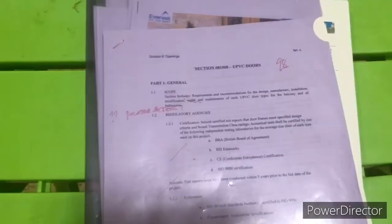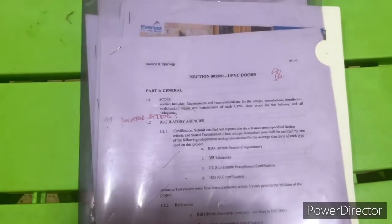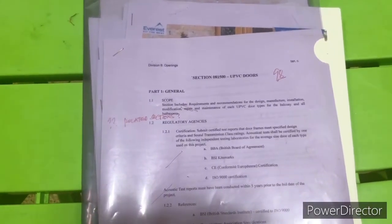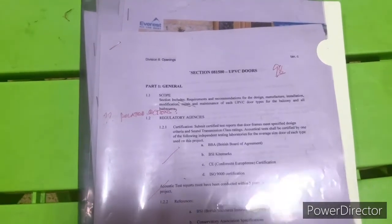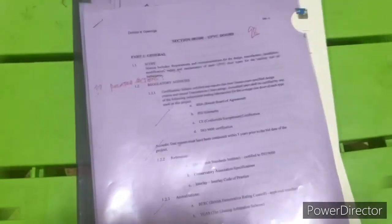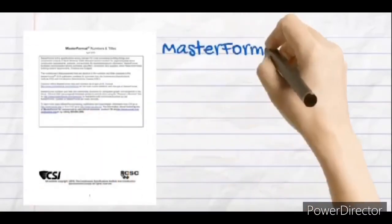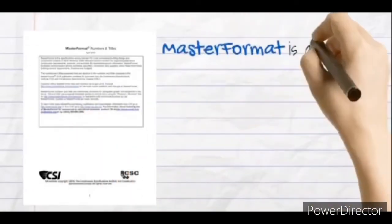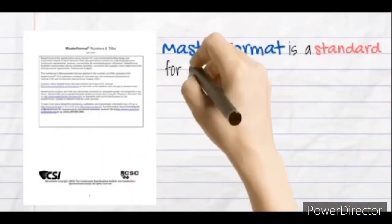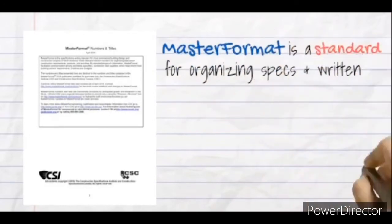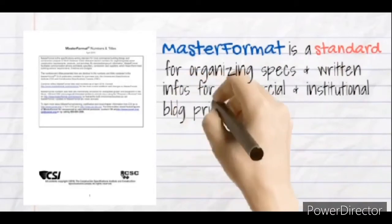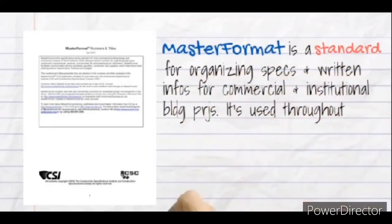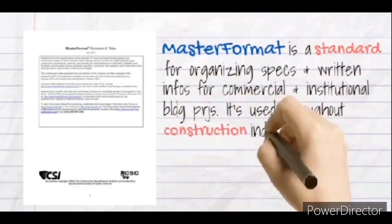I'm going to show you my old project from my building technology class to give you an idea of how to do technical specifications correctly. To do so, you will be needing MasterFormat. MasterFormat is a standard for organizing specifications and written information for commercial and institutional building projects, and it's used throughout the construction industry.